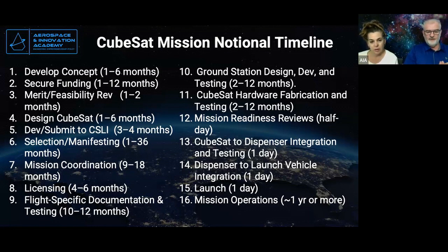So when we say designing your CubeSat, we're talking about CAD models. We're talking about all of that associated paperwork. All of that becomes part of your submission to NASA's CubeSat Launch Initiative. It normally comes out during the week of SmallSat, early to mid-August. And then the due date for that response to a call for proposals from NASA normally is the first week of November. So from November to March or April, let me share a few thoughts about designing your CubeSat.